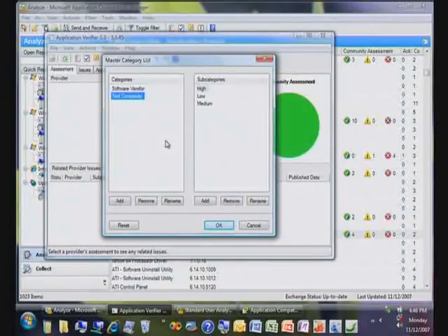The most successful customers I have worked with who are doing a Windows Vista deployment and doing their compatibility testing categorize and do their testing by role, because people in the same role generally use the same pieces of software. So if I'm working with an airline, I'm looking at the gate agents, the people who are taking the tickets and checking people in and making changes. That's a role. They have a set of software. Maybe it's 20, 30 pieces of software.